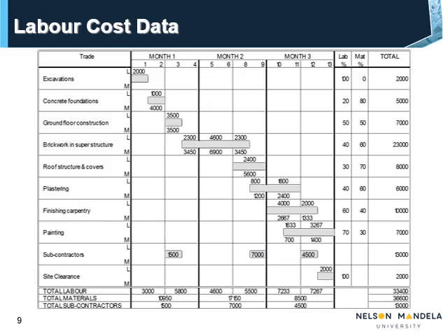In this case it would be 2,000 Rand and 1,000 Rand, and then write the total amount of 3,000 Rand in the same column, next to the total labor cost, in the table at the bottom of the bar chart. Do the same for the consecutive fortnights, week 3 and 4 with total 5,800 Rand, 5 and 6 with total 4,600 Rand, etc. Be careful, do not add the subcontractor cost. Remember, subcontractor cost is a separate cost item.